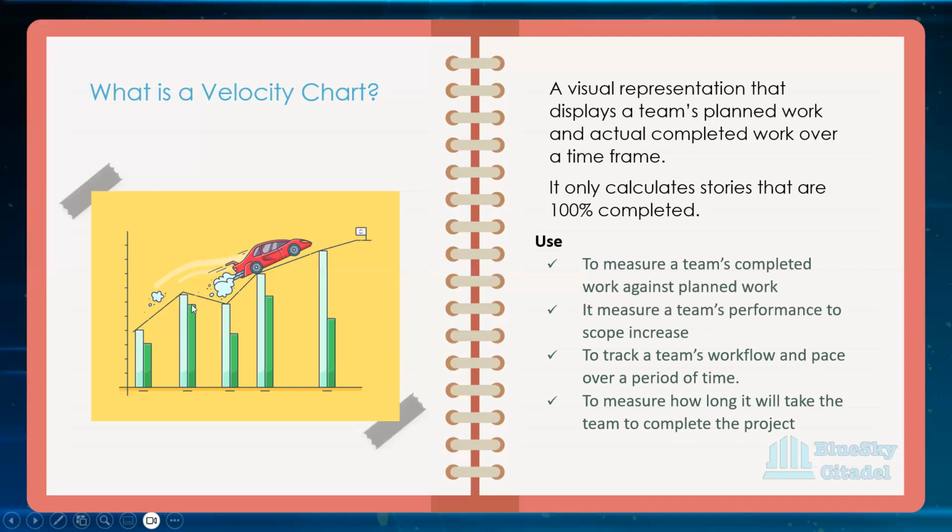So they planned almost the same thing that they were able to complete, and then they did less. But look at what they did in the next sprint. They now planned more work. You did less over here, but when you were going to plan for what you were going to do in the next sprint, you even planned more than what you planned prior to the other sprint. And then, okay, so they were able to complete more than what they did, but it was still too much. And then even though they were not able to complete that, the next sprint, they took it higher. So they were not following their velocity chart while they're working. They are not allowing it to guide them when they are committing or planning work that they needed to do. So it's kind of erratic if you look at it.